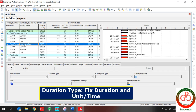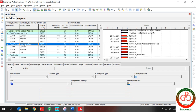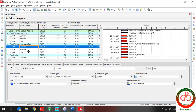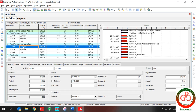Let's talk about another duration type in Primavera P6. In Fixed Duration and Unit Time, we focus on completing the activity within a fixed time period regardless of resources assigned. The work is also very important, and for Fixed Work the estimated duration does not change.